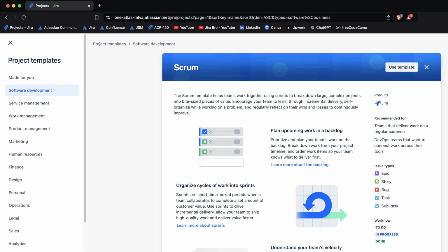That's one thing. Another thing is, of course, when you're creating the Scrum board and you create an issue, that issue is not going to be visible because you haven't started your sprint yet, and it's going to go within the backlog itself. And when you start the sprint, instead of seeing the board name, you're going to be seeing something like active sprints, and within those active sprints are going to be issues that you define within the backlog and put into the sprint itself.